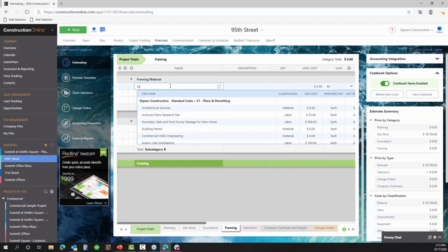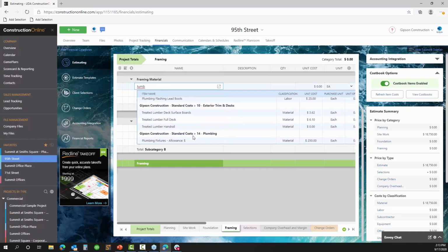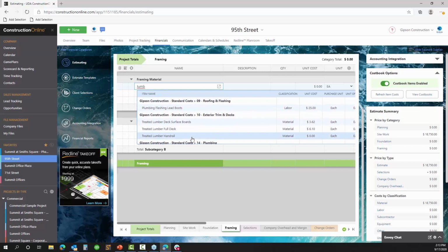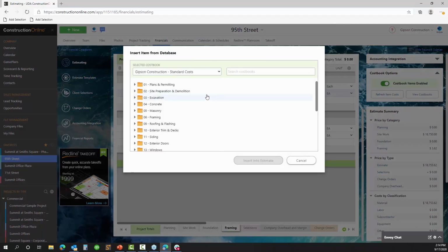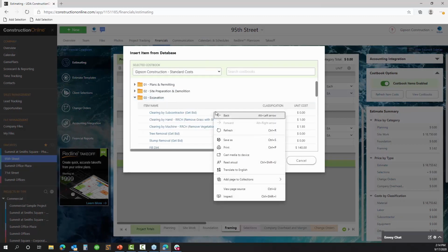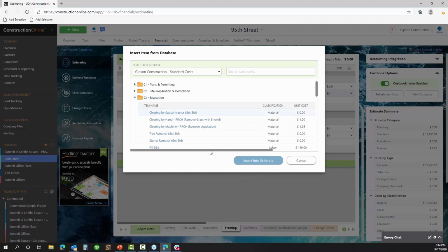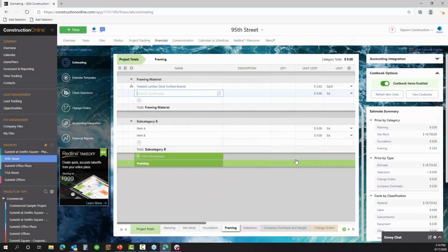That way you make sure that even if it's not the exact amount right away, your ballpark numbers aren't so wildly off that you make a huge mistake and potentially make a horrible error when you're putting an estimate together. Now, of course, for items whose pricing doesn't change day to day, the cost book becomes even better because you can keep the cost books updated on, say, a monthly or maybe quarterly basis, which we have found is another effective way of using the cost books as well.